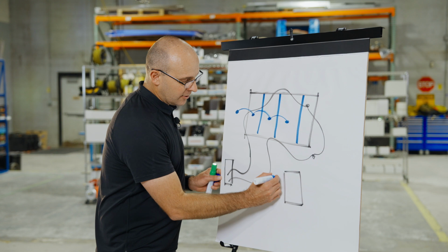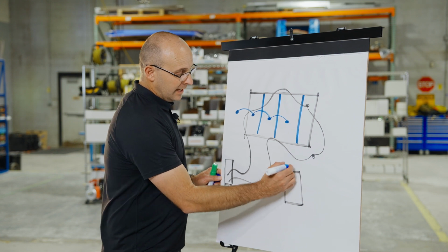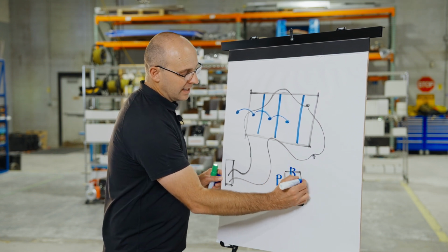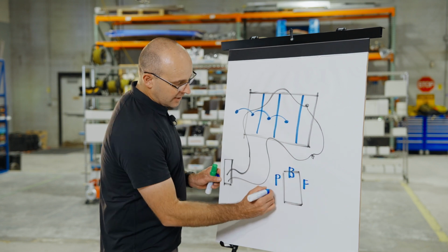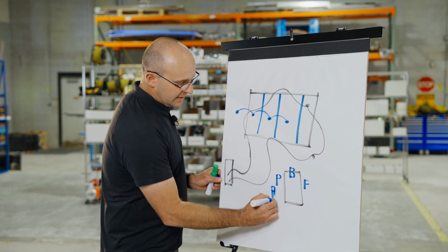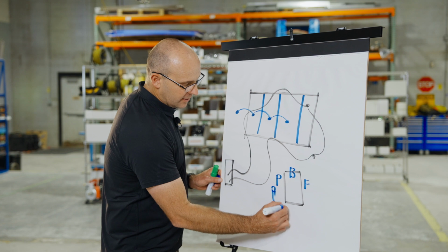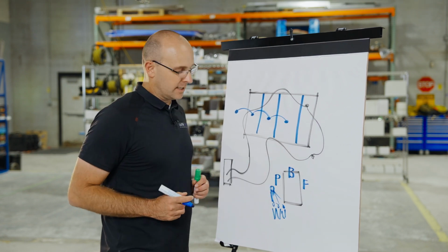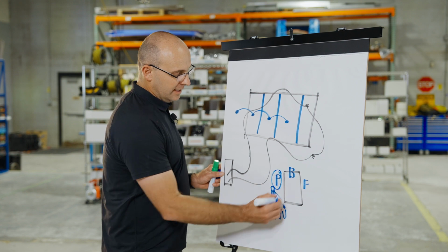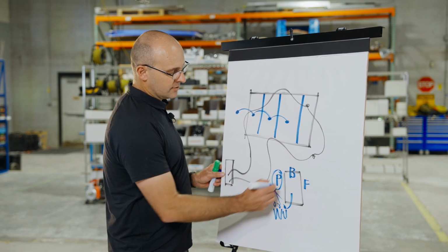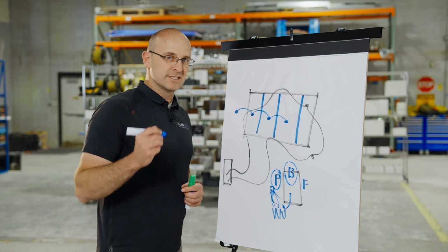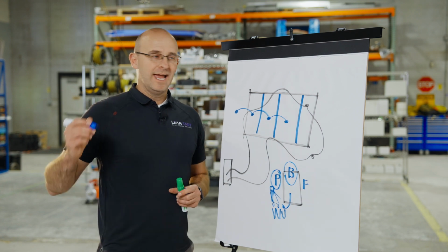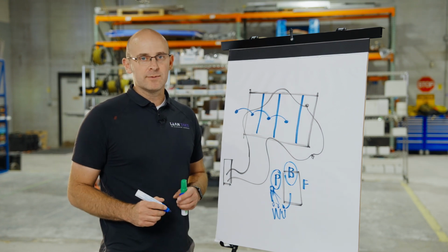So when they get there, I'll put P for plan, and then B for build, and F for finish. That crew with the leader gets to orient the other crew members and say, hey, this is the plan, how we're going to build that work. So that's the plan part. Then as the crew comes in and does the work, we build it right and inspect it and do it right and tell the crew if there's any problems with quality.